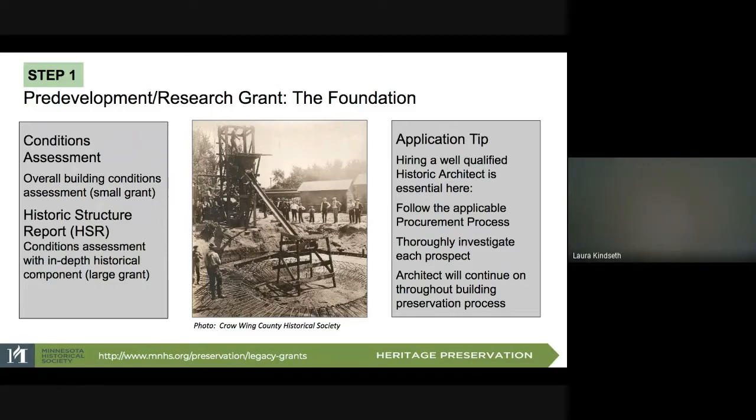And note also that although the informal notice here requires that you contact a minimum of 3 prospects, we like to recommend that you contact many more candidates in order to receive a larger pool of candidates, as all candidates may not respond.